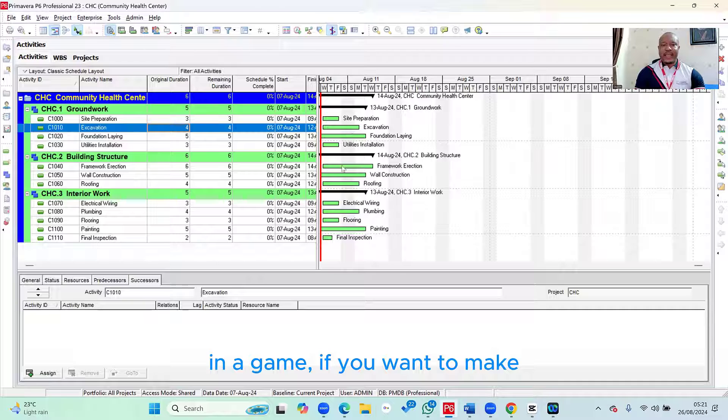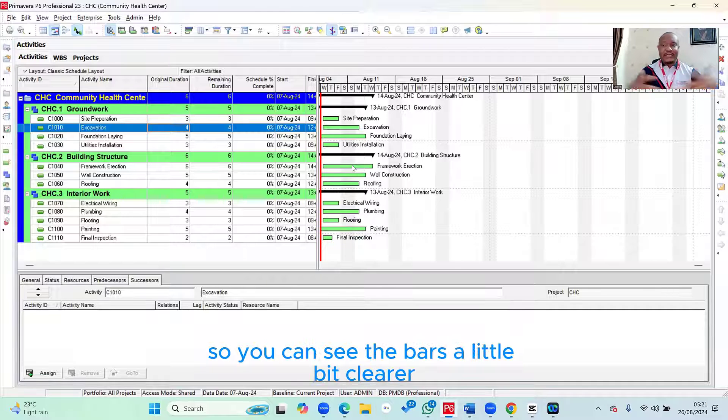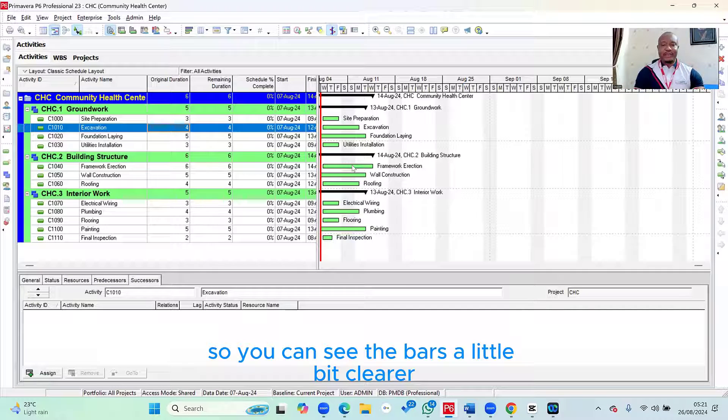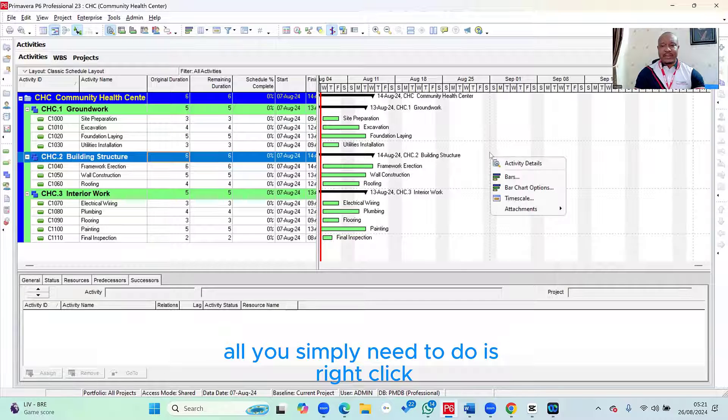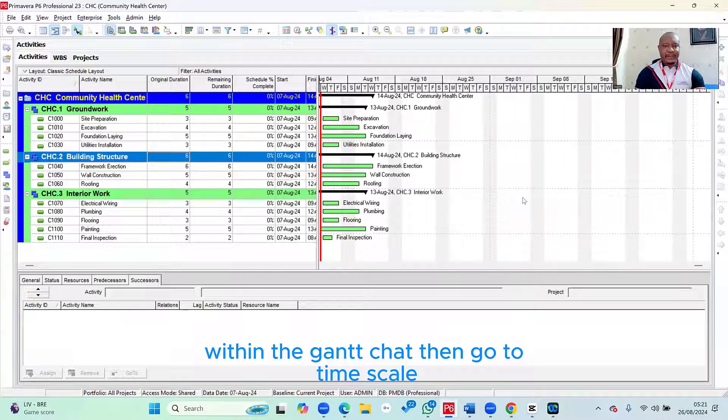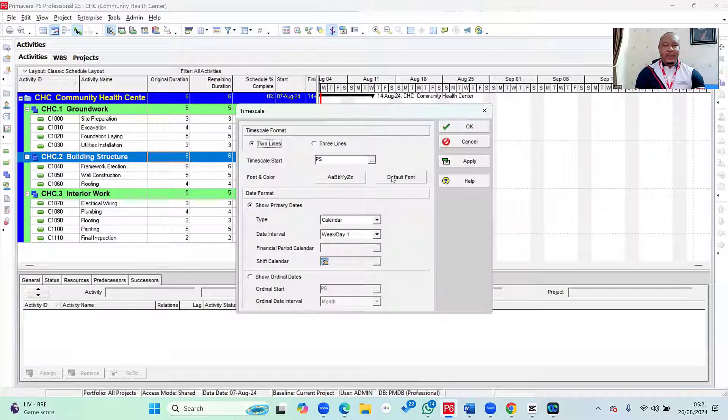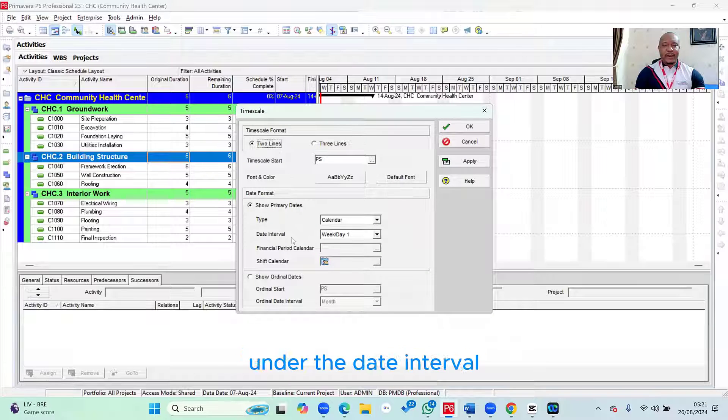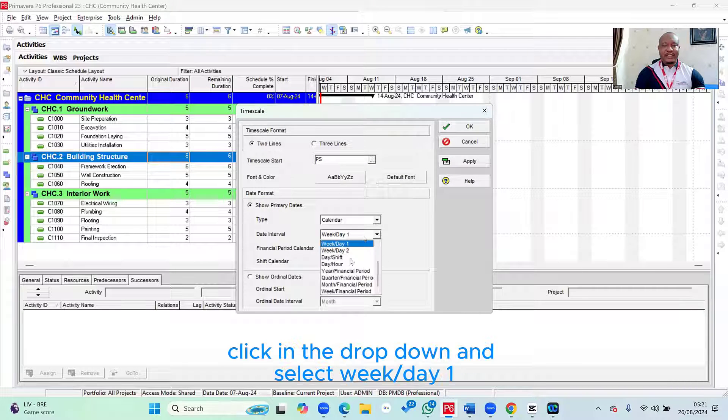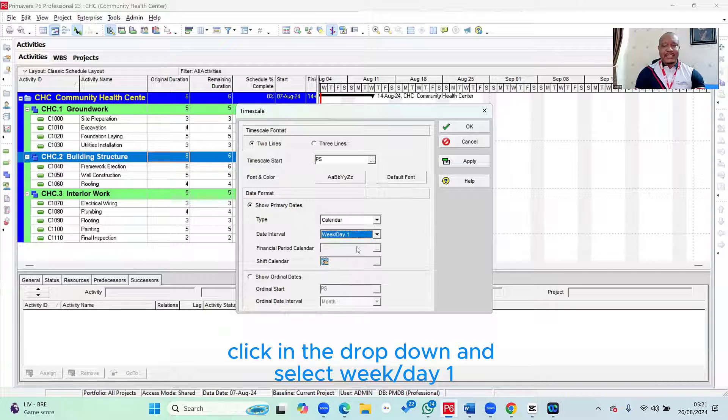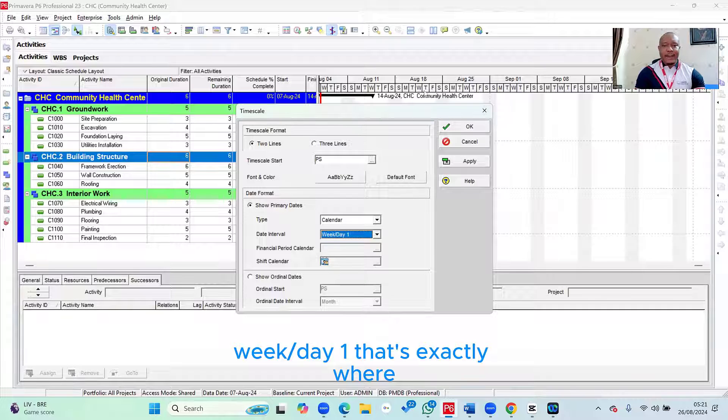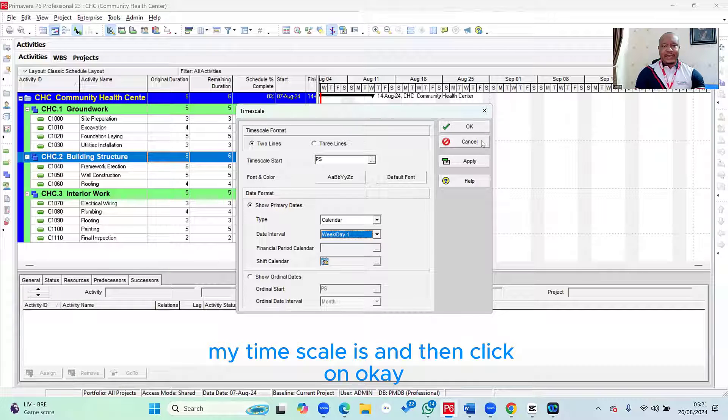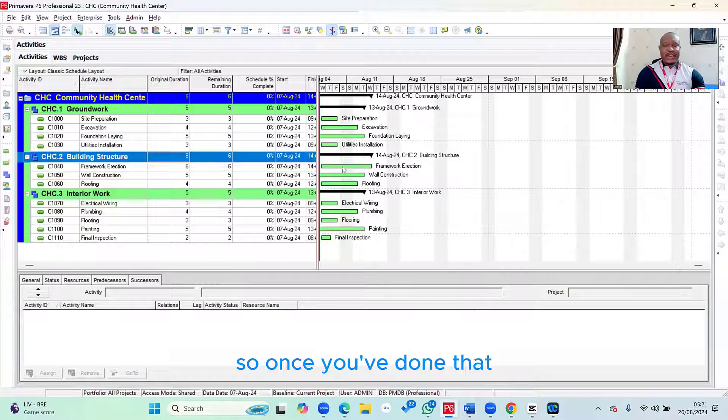And again, if you want to make your timescale to be a bit more granular so you can see the bars a little bit clearer, all you simply need to do is right click within the Gantt chart, then go to timescale. And when the timescale window pops up, under the date interval, click in the dropdown and select week slash day one. That's exactly where my timescale is. And then click on OK.